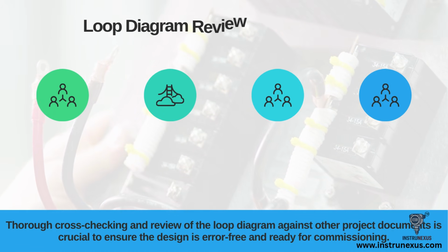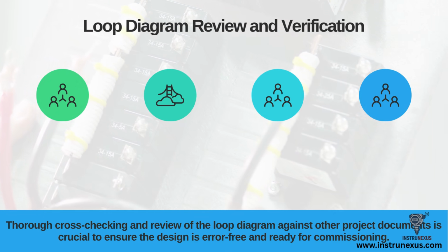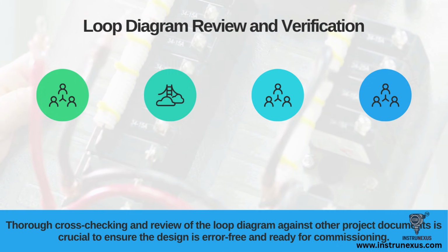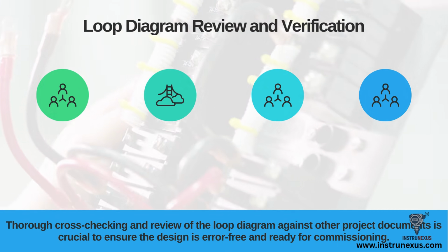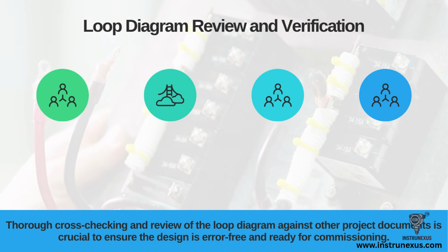Creating the draft diagram is only half the job. The review and verification step is arguably even more important. A single error on one loop diagram can cause hours of delays and confusion during commissioning. To prevent this, we perform several rigorous cross-checks.